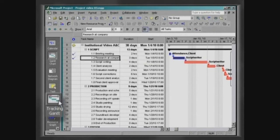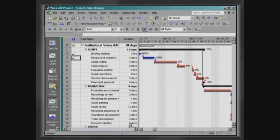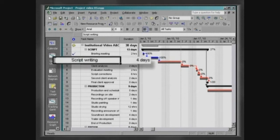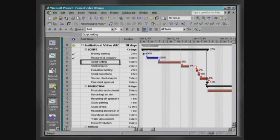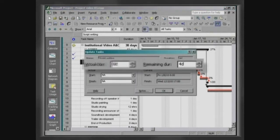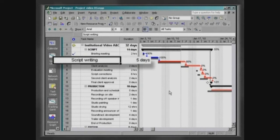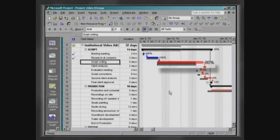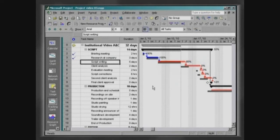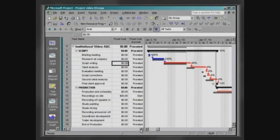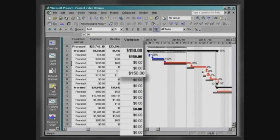Observe on the Gantt control chart that bars representing concluded tasks are painted in blue. The script writer has already been working on writing the script for four days and will still need one more day to conclude the job. Click on Update Tasks and determine the actual duration as four days and the remaining duration as one day. Observe that the duration of this task has been increased to five days and the percentage of finish is now 80%. Click on View, Table, Cost and observe that this shows a variation of $150 for the cost of this task.